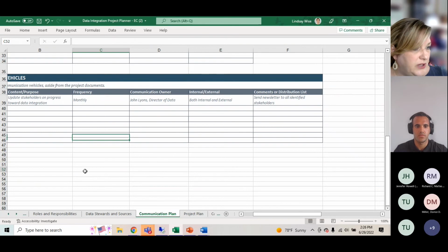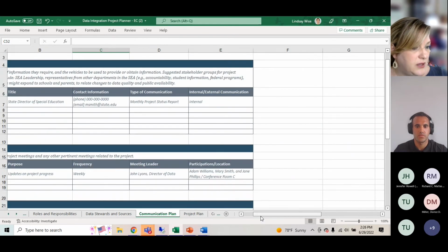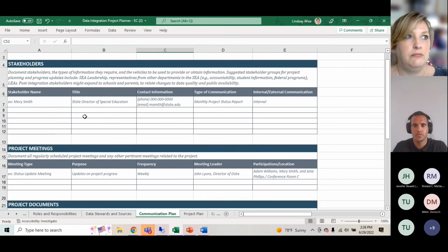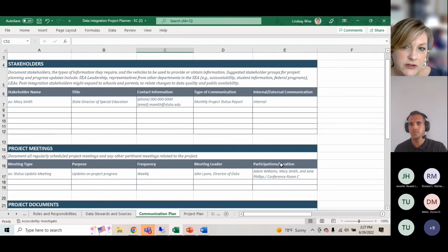A communication plan, as I was talking about, it's so important to think about when do you talk, who needs to know, when do you escalate an issue? If something goes wrong, say in setting up Generate and the person installing Generate is running into trouble, have they let the project manager know? Has the project manager let the head of IT know? I don't know what that chain might be, but it's very important to have escalation chains to know who needs to talk to whom when. Any questions or thoughts or observations on this work?